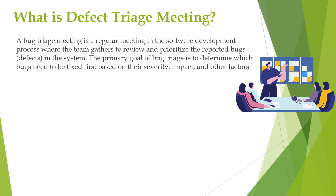Next, the team assesses the severity of each bug. Severity is usually classified as critical, major, or minor based on its impact on the system. Then they perform prioritization — bugs are prioritized based on severity, that is, the impact on the system, and also based on factors like customer priority or project deadlines.